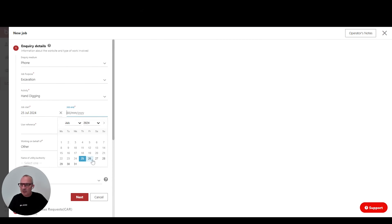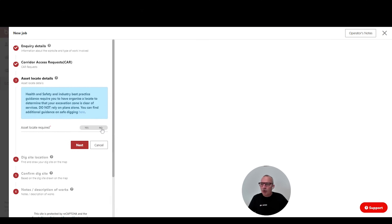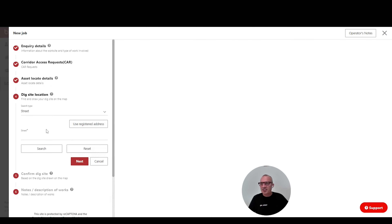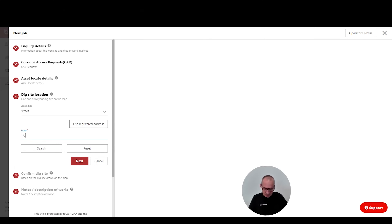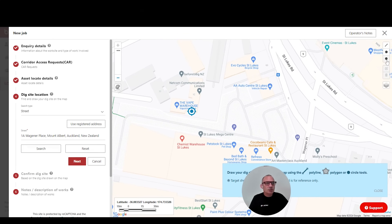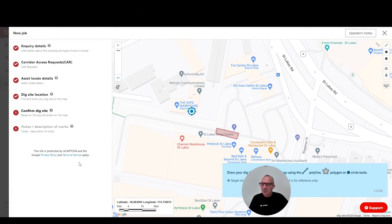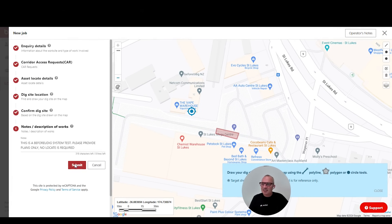No different to normal — I'll put my job start and end date, my user reference, which could be a PO number. I am not going to ask for a utility locate today because I'm just carrying out a test job. We're going to say we are doing that at 1A Wagner Place, which is my office location. I'll draw my dig site — I'm just going to say I'm digging up the car park there. Click next, confirm the address — that's all good — then add notes and description of works. This is a test job, so you would put in whatever type of work you're doing, then click submit.